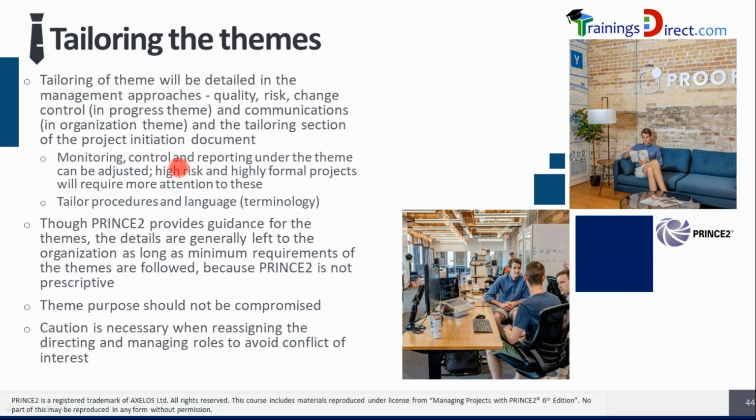High risk and highly formal projects will require more attention to these. The more the project risk, the more the formality, the more the tailoring upwards rather than tailoring downwards. Tailor the procedures and the language, meaning terminology. PRINCE2 terms can be tailored. For example, the business case theme may be called something else, such as a justification theme. The quality theme may be labeled as a requirements theme, and so on. Similarly, the project board may be called a steering committee.